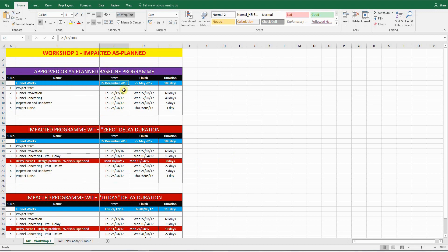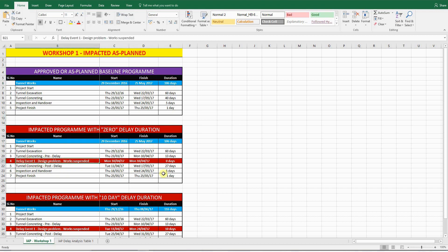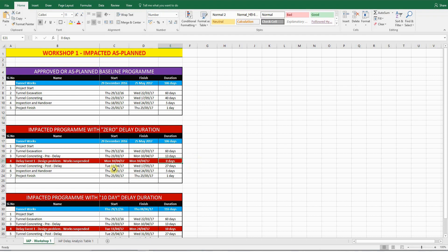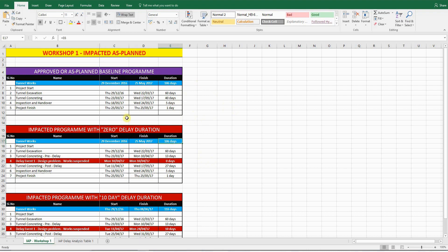If you go back to the first program, you can see that the tunnel works starts on the 29th of December 2016, and finishes on the 25th of May 2017. That's 106 days. So once you've inserted this delay event, and you give it zero days duration, and you relink all the activities logically, I'll show you how to do that. The most important thing you have to check is the start, finish, and duration. Make sure nothing has changed.